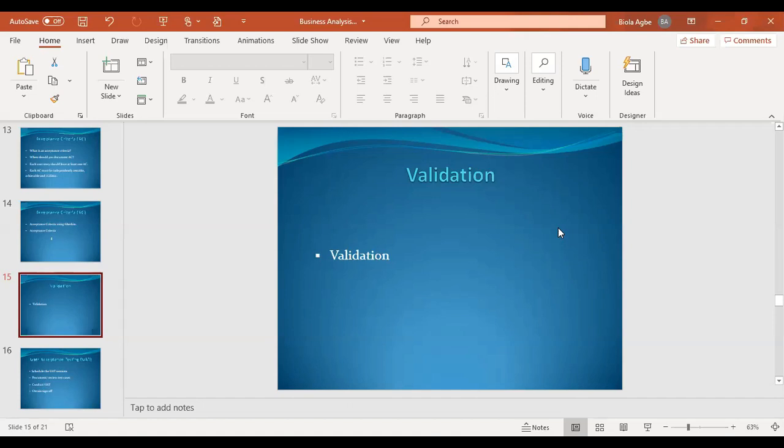Then it will turn to 2.0, like that till you finish the project, if it leads to 3.0, or yeah. But each time they provide sign off, you actually change to the next whole number, 2.0, 3.0. Yeah, so that's validation.